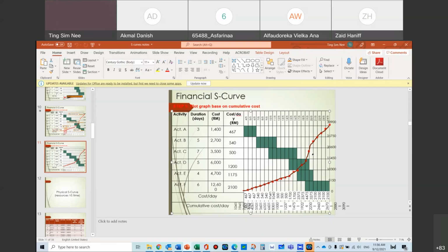So with these two PV lines, one line is about how much money you should be receiving from them, and the other is how much you'll be spending on the project. With that difference, pick the biggest difference, and that will be the amount of money you really should have to tide you through those very negative months. So that is one way of doing it.